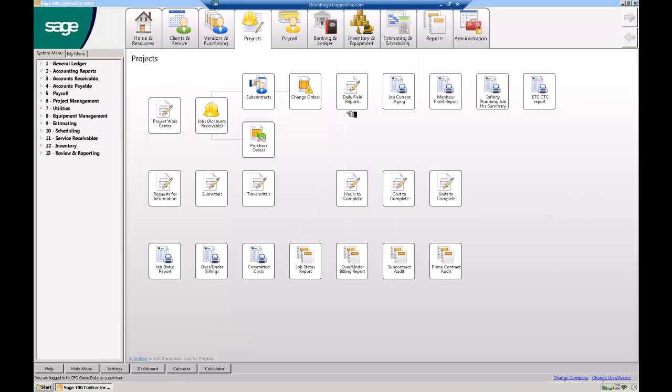That's a report a lot of our clients use. You didn't mention equipment in any of your things, and I'm just going to address it real quick. If you have equipment, we allow you to charge your equipment, and I imagine you have some large pieces of equipment, allows you to charge your equipment cost to the job just like you would charge an employee to the job. And so that would be one module that you may really want to use.